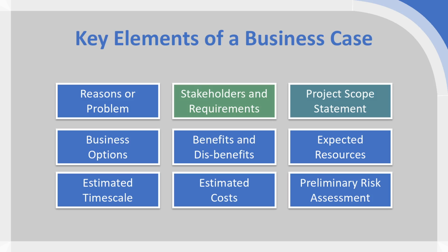Once we have our stakeholders and our requirements, we can move on to the project scope statement. If we look at the stakeholders and what they need, and we obviously have our underlying problem, then we'll be able to set the scope for the project, typically expressed in a single statement. So for our example of refitting the room, the project scope statement may be: this project is aimed at renovating room A305. It will include refitting electrical equipment. It will involve repainting the walls and redoing the flooring. So you see how you capture the scope of the project in a single